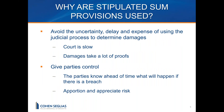Why are stipulated sum provisions used? They're used to avoid the uncertainty, delay, and cost of trying to prove damages. Litigation is slow, and even in arbitration it can be expensive and time-consuming. To prove damages, you generally need a lot of documentation — accounting reports, payroll reports, invoices — and somebody to testify about all of those documents. By agreeing ahead of time to the measure of damage, you've taken out some of that proof requirement. If somebody goes to court on a breach of contract, they have to prove two things: that there was a breach, and what damage was caused. The liquidated damage deals with that second issue, so all you have to prove is that the breach occurred.